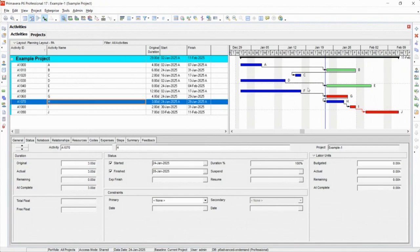In this case too, you would change the links. So F goes to H, and then H goes to G, I, and then J. So that's a little bit about progress override.